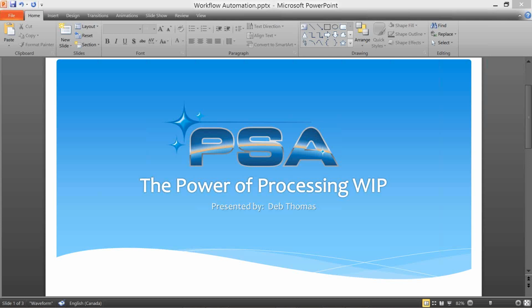The final version of WIP is a completed job type of WIP. Costs and invoicing stay on the balance sheet until the job is completely finished. It doesn't necessarily work as well in our business for companies that do repair, reconstruction, new home, general construction, those longer term jobs. However, it's a very viable method for the short jobs, somebody that's primarily in emergency or mitigation services. If you have a carpet cleaning division, things like that, it can work very, very well.